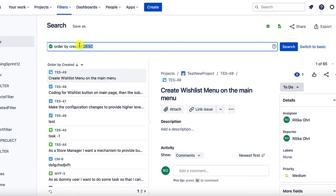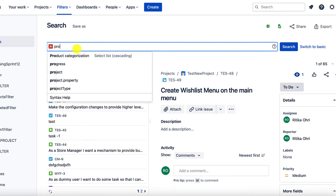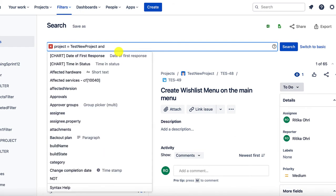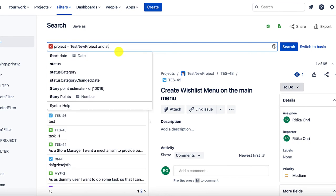I would like to create a filter from my project TES new project. So, I will be typing my project name and I would like to create a filter for only the issues which are in progress. So, let us go ahead and give it a status as criteria.